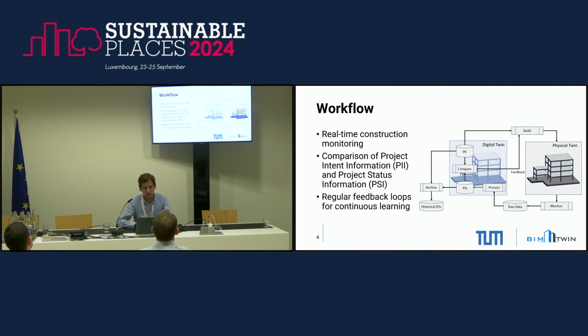The main methodology is that on the one hand we have the project status information, based on the monitoring, and on the other hand we have the project intent information, so the construction plans, the BIM models, the schedules, and such things, and we compare them to see if there are any deviations.